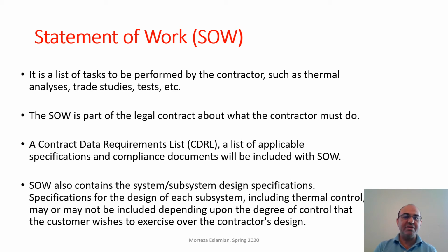So what is a statement of work, which is a part of the proposal, SOW? It is a list of tasks to be performed by the contractor or by the industry. Industry is the contractor, such as the thermal analysis, trade studies, tests, and so on.